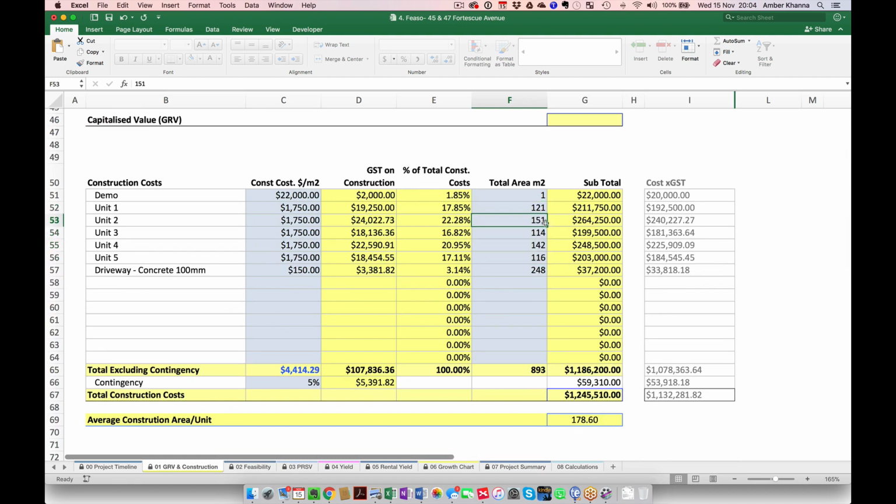I have not built a 4-bedroom unit that was only 151 square meters. A 4-bedder built area must at least be 160 plus or 170, if not 180. 150 is a 3-bedder.